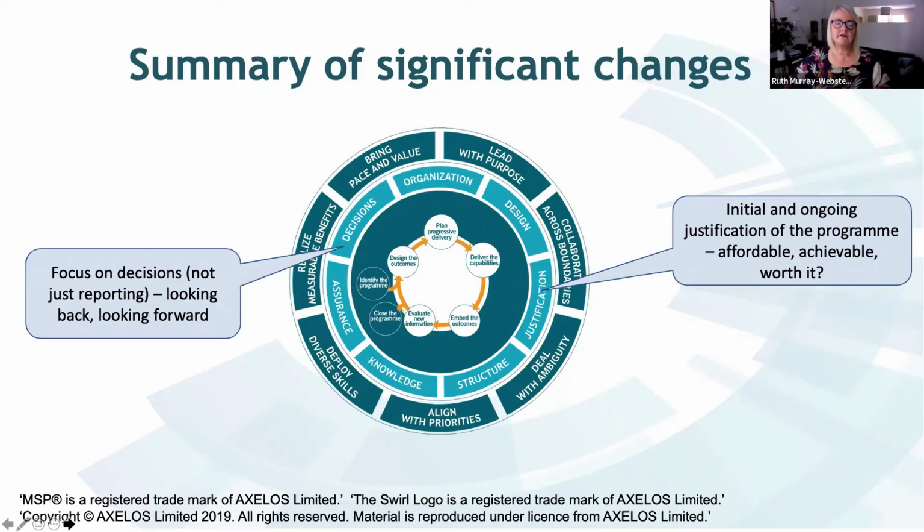There's also much more of a focus on decisions, not just on reporting. Not just "let's report some stuff", but "what are we going to do?" So decisions are not just looking back, but also looking forward, with hints of how programs can be far more anticipatory of change, disruption, emergent risk, etc. in decision making. That ties into a step in the process at the end of a tranche, before you either close the program or go to the next one, to say: what's new here? Not only what have we learned in this tranche, but also what's out there in the environment that we need to take account of. All this was implied, but not really nailed, I thought, in the previous versions.